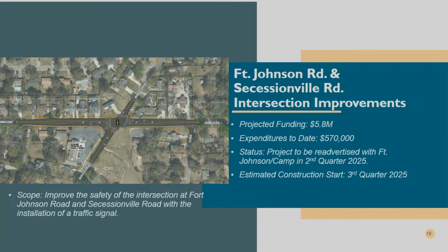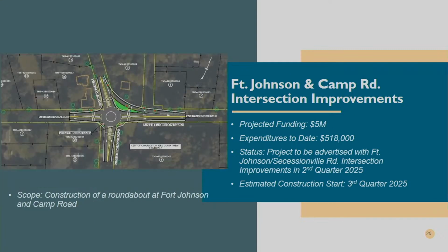With this project, our approach is going to be to combine it and bid it with the next project, the Camp Road Roundabout project. These projects are in close proximity to each other. We're going to combine them and bid them together in hopes that we'll attract more bidders and a more competitive price. Hoping those will go out late summer, but sometime this year, as we finish up right-of-way on this project.